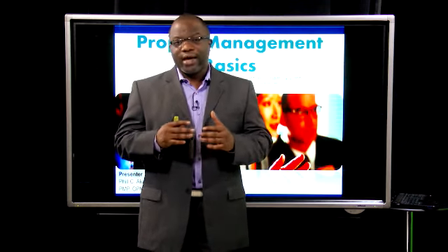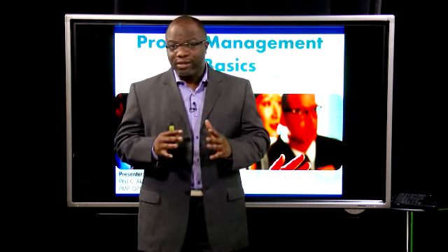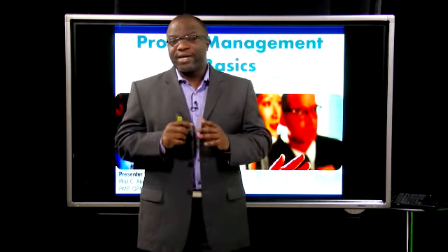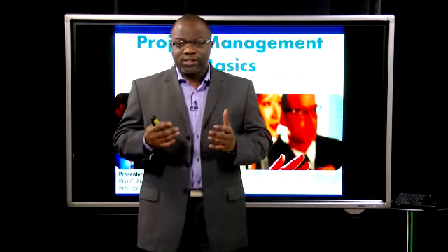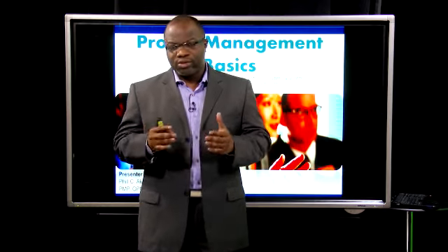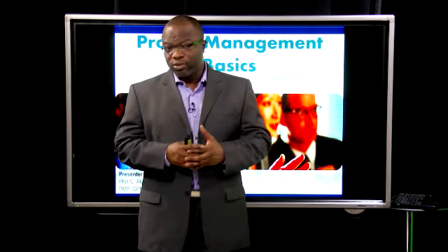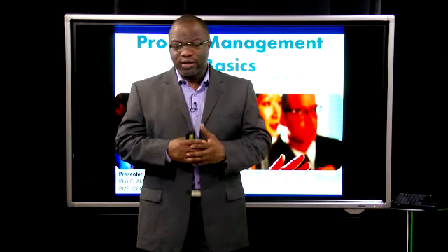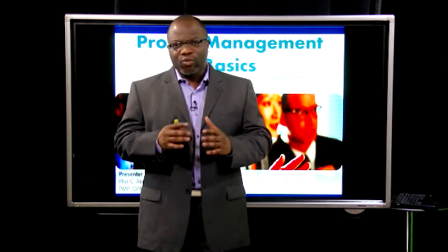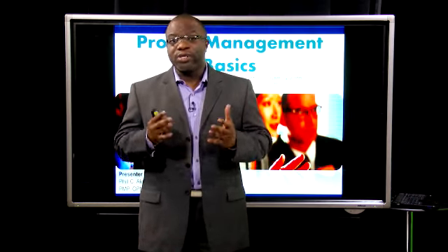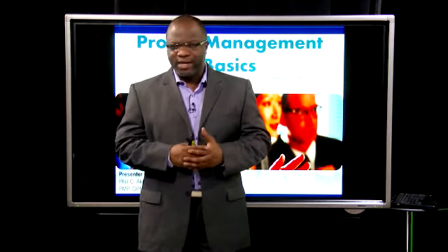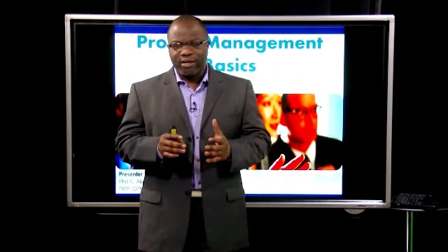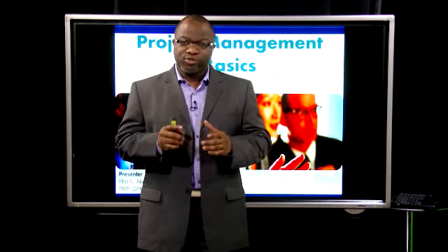Some projects need a lot more planning than other projects. Some projects actually become almost routine, though there's a discrete deliverable. And I say they become routine because you've been there, done that. Take, for instance, a construction project to build a 2-story structure. If you work for an organization involved in construction, you've done it so many times that what you did in previous projects could be used in current projects, and that reduces the cycle time when it comes to planning. If you've been there, done that, you've got a better idea of the landscape, so your planning might be more succinct and straight to the point.